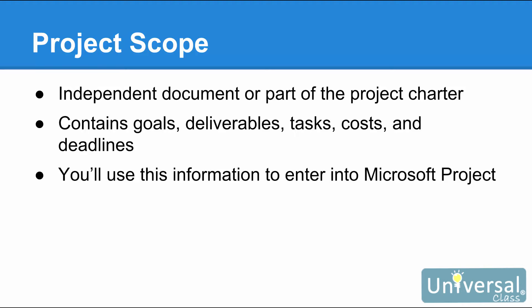In addition, you'll want to include the boundaries of the project, the team members, process for verification and approval of the completed work, and guidelines for decision making and changes to the project. You'll use the information you enter into your Project Scope in Project, both to get started and to manage your project from beginning until end. If you bypass the Project Scope in favor of going straight to Project, you'll likely forget the important details that will hamper your project's progress.